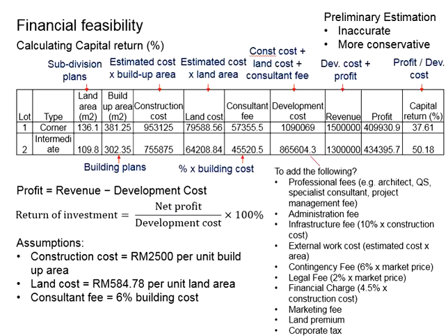Therefore, the estimations of those costs will be on basis of certain percentage out of the building costs or the development costs. Now the question here is, where do you get those percentage?